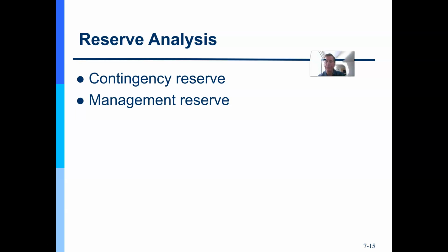Now, management reserve is not something the project manager controls. Management reserve, in fact, is something the project manager is probably unaware of. And the management above us will probably set some aside. I used to do this at one of my last positions. When I had a project budget, I would take about 12%, and I'd go talk to the budget person and carve out a set aside of about 12% for things that we didn't realize. And those are called unknown unknowns. We didn't see the risk happening or coming, and so we could not plan against it.